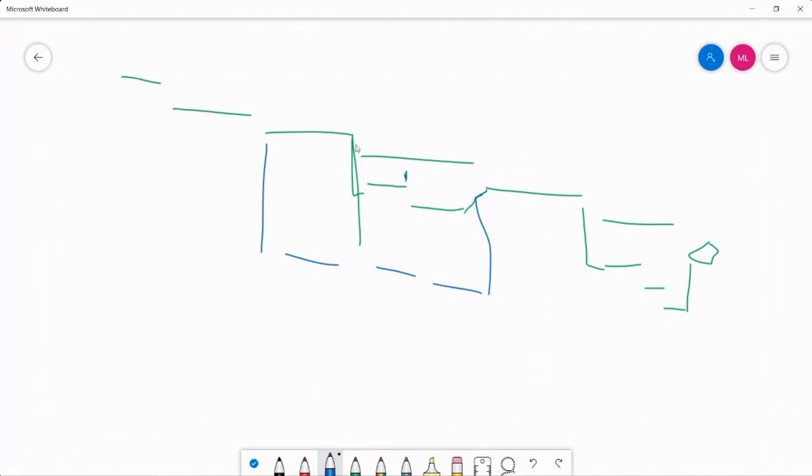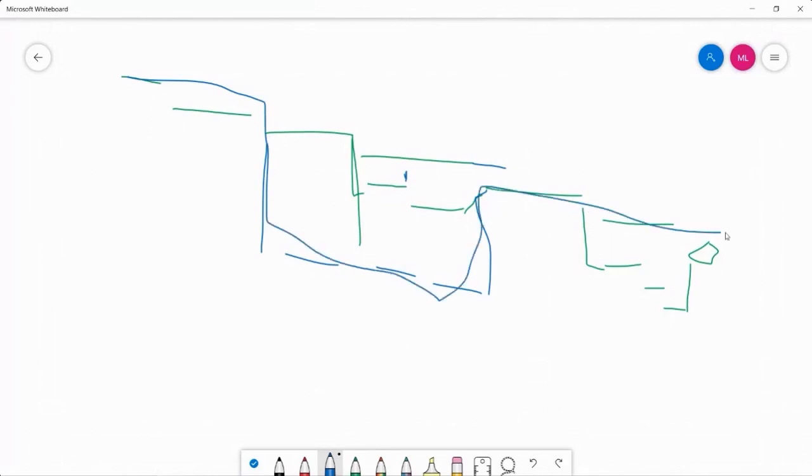So you just want to be aware of them that if anything goes long in these, if this activity here gets extended, then your new float path comes down here. That looks like a real mess, but I think you're getting the idea.